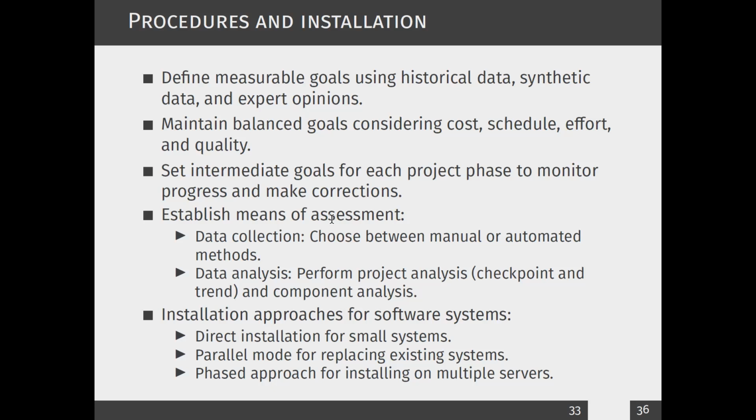Then comes installation, especially when it comes to deployment, installation approaches for software systems. So you can go for direct installation, or you can use parallel mode, which is where you replace the existing system, where once you install, you can completely remove the old system. So in deployment we discuss these ideas.